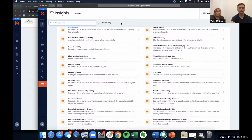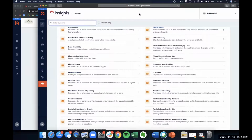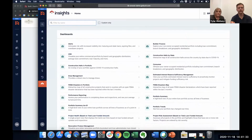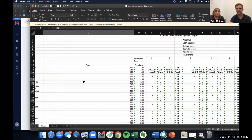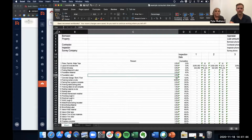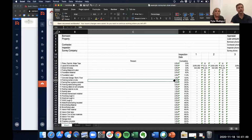Great, thanks. Another question was, for the draw schedules, you said that you can build in business rules. Are those customizable per job, or is it per client? Yeah, so you can load in templates, right? If you just have a pretty standard percent complete, or maybe a handful of percent complete templates where, okay, we always say the concrete basement floor is 1.5%, framing is 18%, and so on and so forth, we can load those templates in for you, so you never have to key anything in, obviously.